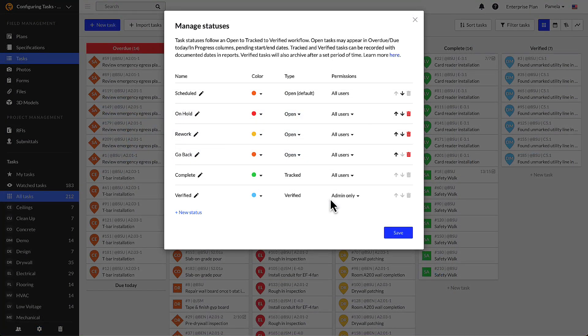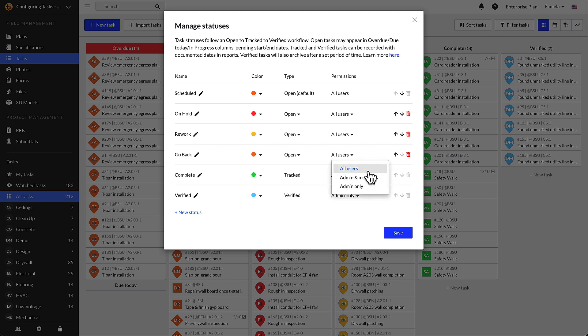Verified tasks will be archived after a set period of time determined under the settings tab. However, you can limit the access to certain statuses by editing their permissions. You can adjust the status such that it can be used by all users, admins and members, or admins only.